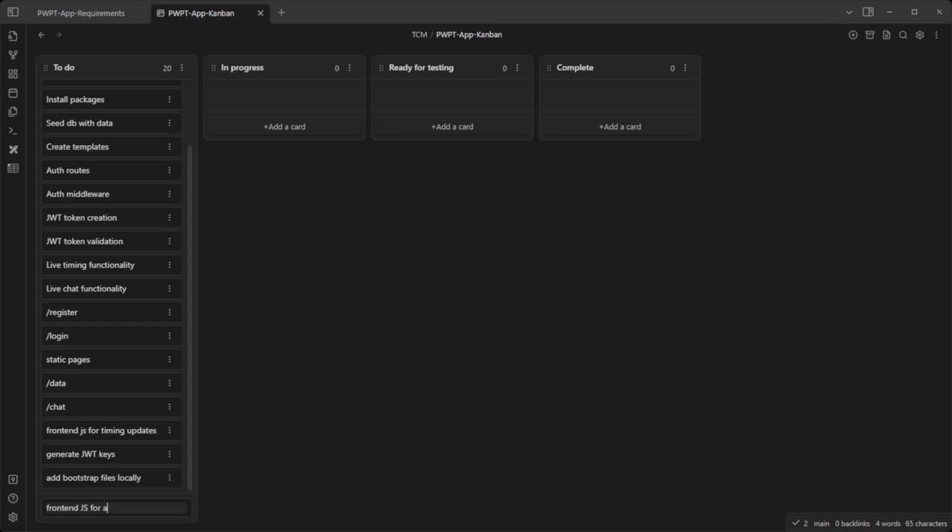So all in all, there are really two main deliverables from this process. First being a design document that I can follow to make sure that when I'm building the web application, I don't make lots and lots of changes on the fly and end up with a mess of an application. And the second is the Kanban board or to-do list of things that I need to get done so that the application is ready for testing and deployment on time.